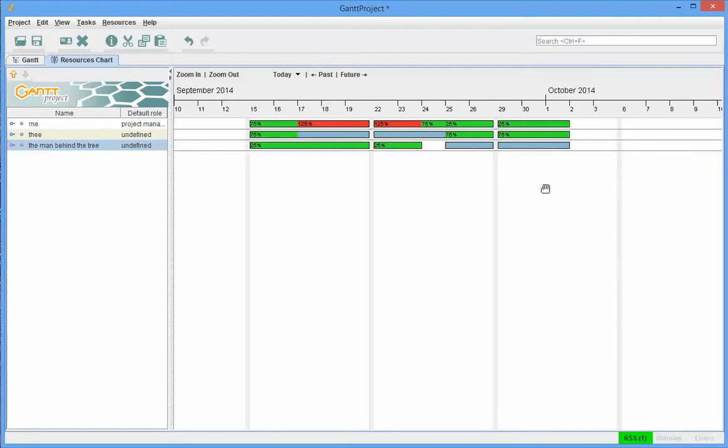And if this really was important to be able to use your people at an appropriate level, you would continue working this problem and assigning appropriate people and time to various tasks until you don't overload anybody, unless you do it intentionally and you may be paying them overtime. And you try not to underload people too much because you're probably going to be paying them anyway. And so you try to make the resources work out.